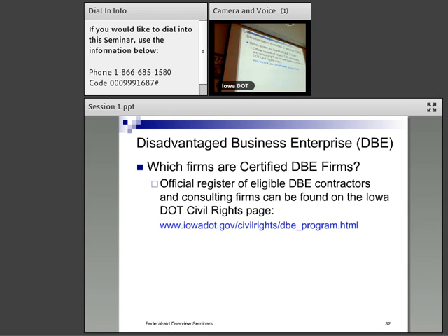They could have talked to the RCE, told them what the problem was, why they needed to make this change at the very last minute. Our civil rights team, we could have said, that's fine. We will note it contemporaneously. It's okay. The adjustment is fine. 5 minutes, 10 minutes tops would have done it.